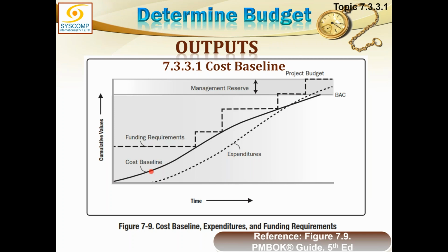Look, this cost baseline, the S curve, is rising continuously in an S type flow. It is rising up to an extreme point. So we can say that this much money should have been spent by now, and the top point is the total BAC budget, right? So this is the last point of planned value. This is the total planned value for the project, right?